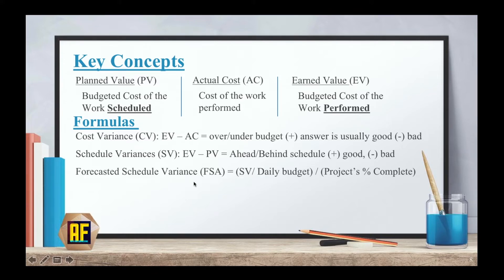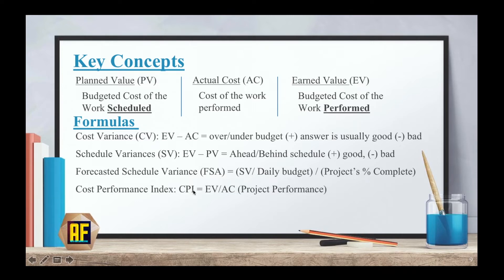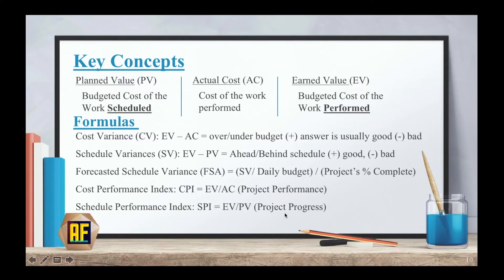The forecasted schedule variance, FSA, will let me know if my project is ahead or behind in days. While the schedule variance gives a dollar answer, the FSA will actually give me an answer in days. The cost performance index, CPI, which is earned value over actual cost, will tell me my project's performance. And the schedule performance index, SPI, which is earned value over planned value, will tell me my project's progress.